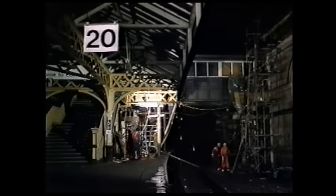Durham Viaduct is one of Britain's finest railway structures. Any electrification works had to be carried out with due sensitivity to protect the great environmental value of the structure and the locality. The Royal Fine Arts Commission, as well as the local authority, were closely involved in the planning consultations, in particular with the design and visual impact that the electrification masts would have.